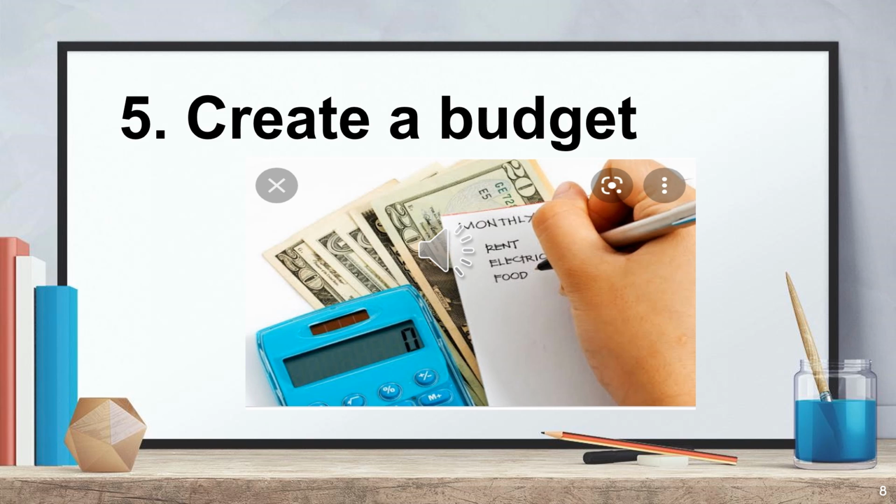When you're setting your initial budget, these numbers might be ranges rather than absolutes. For certain items, you might need to get quotes from a few different vendors. It can be helpful to document the agreed-upon project scope briefly in your budget documentation, in case you end up needing to make changes to the larger project based on budgetary constraints, or if your vendor doesn't deliver exactly what you expected.